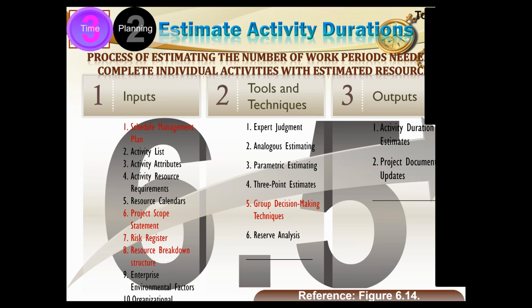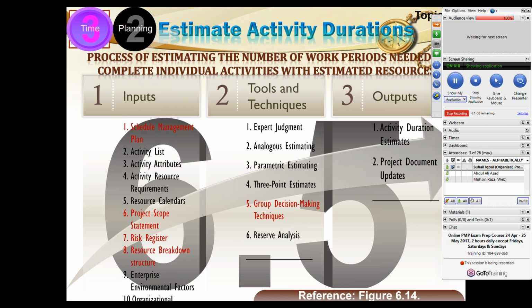If we give equal weightage to all 3, then we divide by 3. That is a simple average. But I am saying give 4 times more weightage to the middle value. So for all practical purposes, we have given 4 weights to the middle, 1 weight to the pessimist, 1 weight to the optimist. This comes out to be 6 weights. So divide this whole thing by 6. That will give me an estimate, a weighted estimate of the activity.